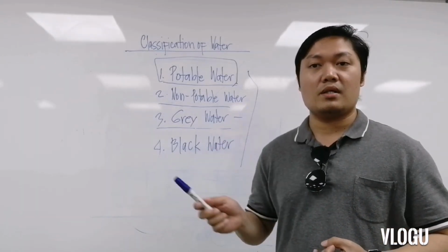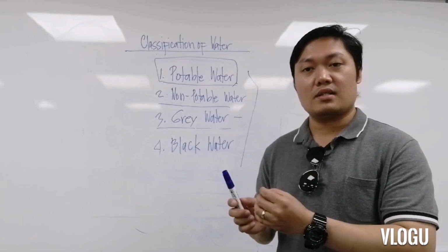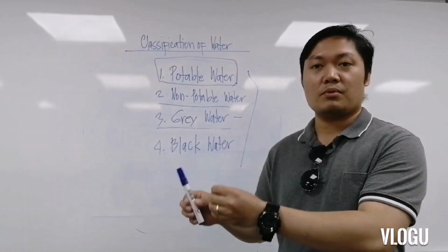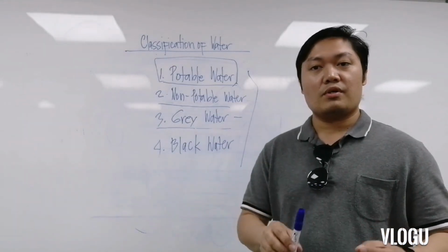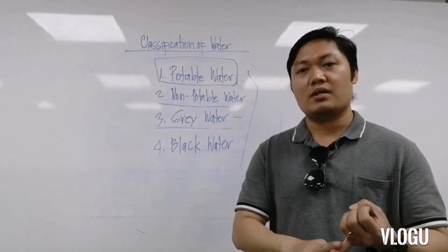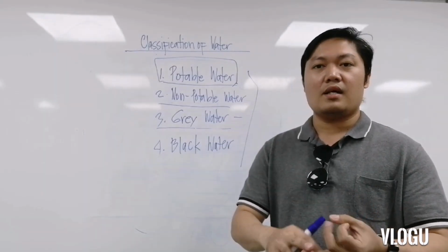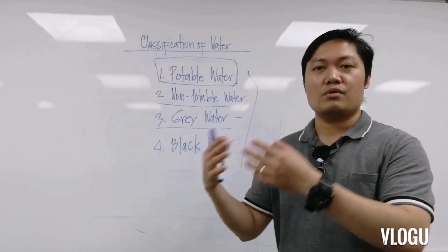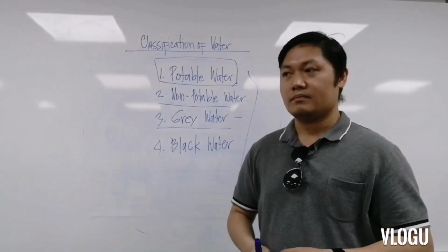You have to submit all the types of material to the project consultant for approval before you use them on site, for example the pipes, the fittings, and necessary related materials.